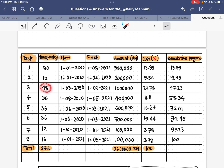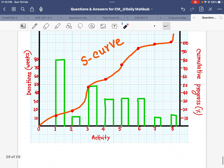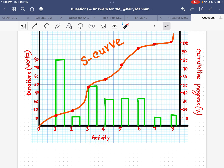For the second activity it takes 12 weeks, for the third it takes 48 weeks, and in the same way I fill in the duration versus activity. Then I need to plot the cumulative progress for each activity. For the first activity the cumulative progress was 13-point-something, so I place that point on the chart.